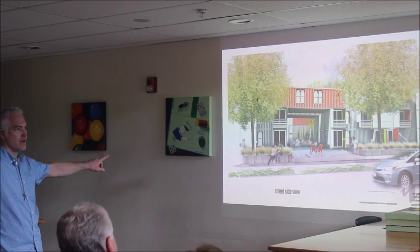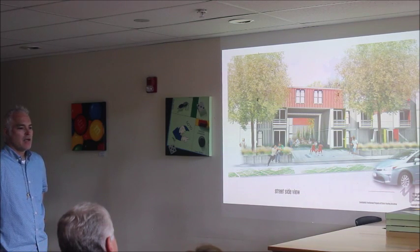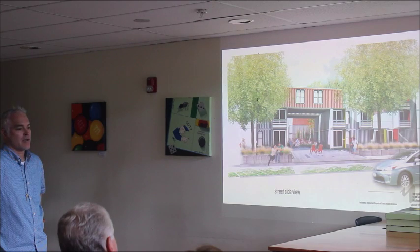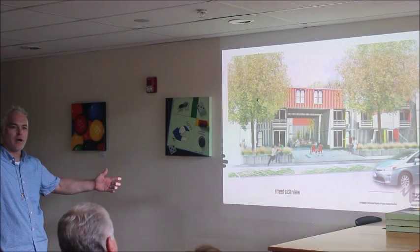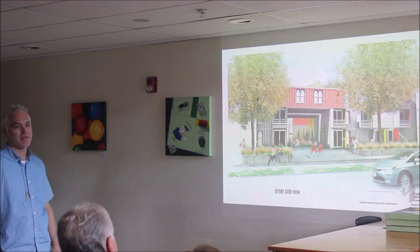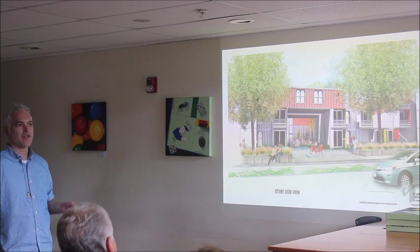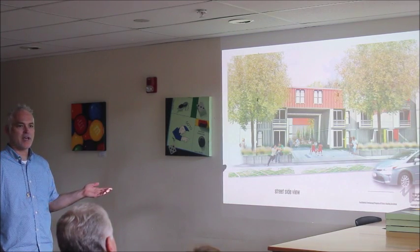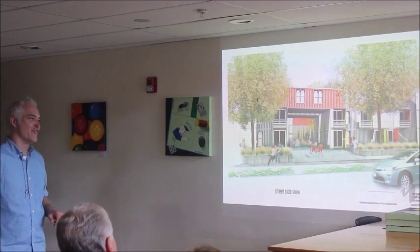We've met with the building official for Brown County and for Davey in particular, and they're totally into it. The most important thing, and actually part of the cost of doing these projects, is that it's not like conventional methods of construction where engineers have a set of details that they give you for load issues. Every design is a custom design for the most part. We're developing a kit of parts because we've fine-tuned it over the last 3 or 4 implementations. It's not a static thing, so we change it every time so far.